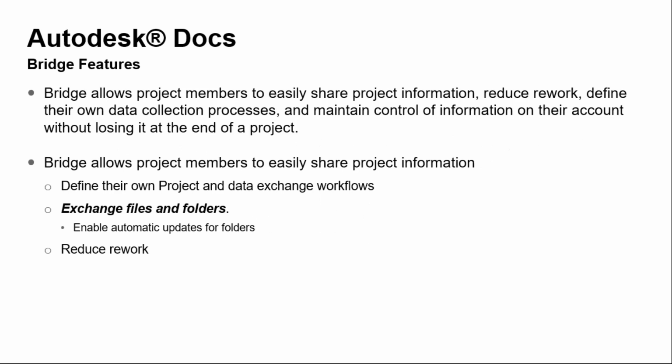The Autodesk Docs Bridge tool provides the sharing of files or folders between projects. When sharing a folder with another project, automatic updates can be enabled. You must be a member of both projects to set up a link or a bridge in Docs.